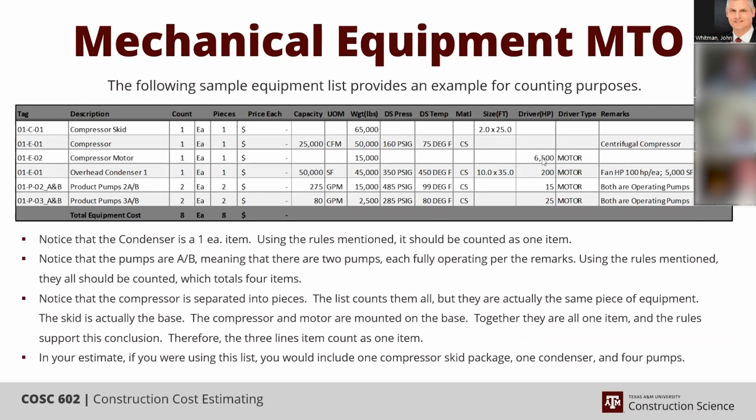And so if it's a tank or a vessel, they're stagnant, they'll install by weight. If it's a compressor, it's like what type of compressor and how many horsepower. If it's a pump, what type of pump and how many horsepower. That type of thing. If it's a heat exchanger, it may be either by weight or it could be surface contact area.